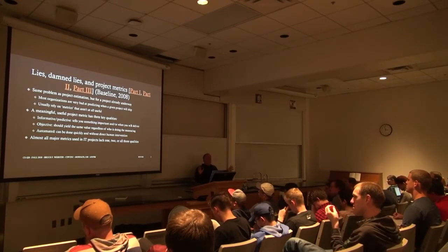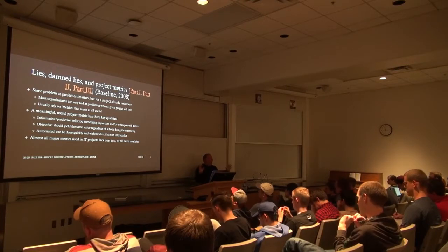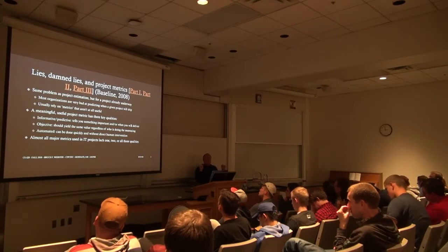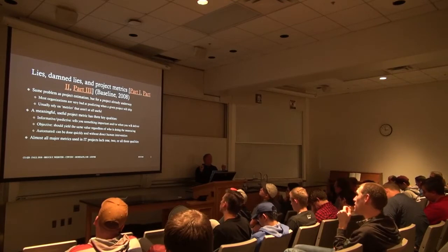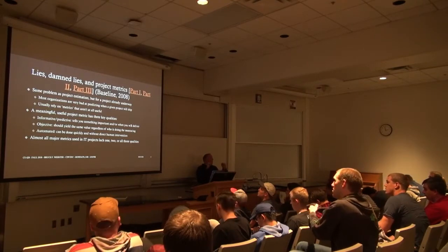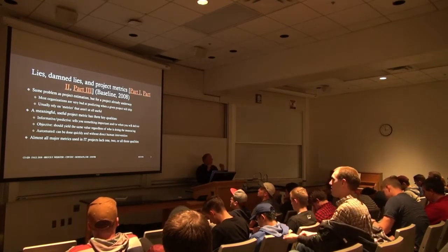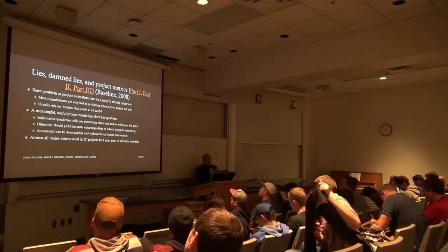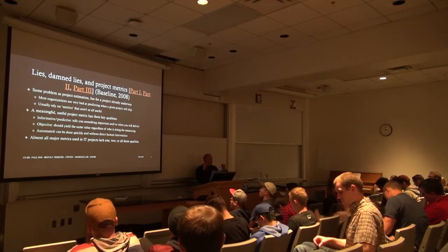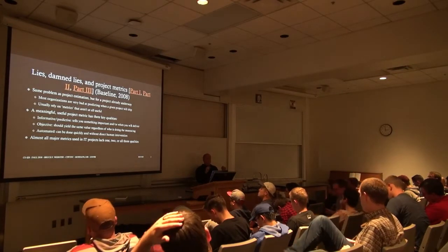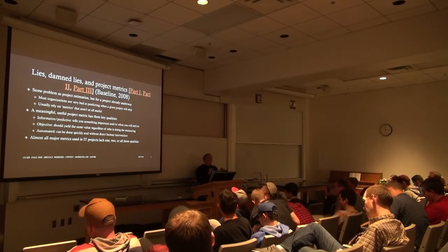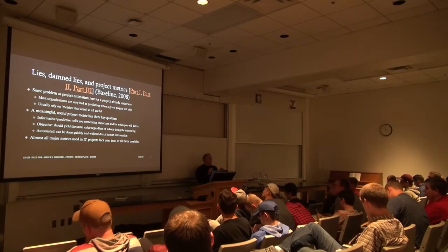For example, we'll talk about a few of those. A useful project metric has to have 3 qualities. It has to be informative or predictive. It tells you something important and/or when you will deliver, which is usually something important. It has to be objective. That is, it shouldn't matter who is producing this metric, you should get the same answer. And preferably it has to be automated. In other words, it has to be done quickly and with little or no human intervention. And the key issue here is almost all major project metrics lack one or more of those qualities. And they suffer as a result.